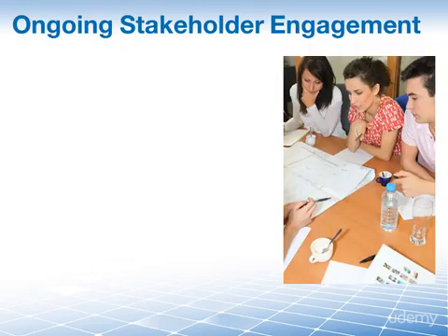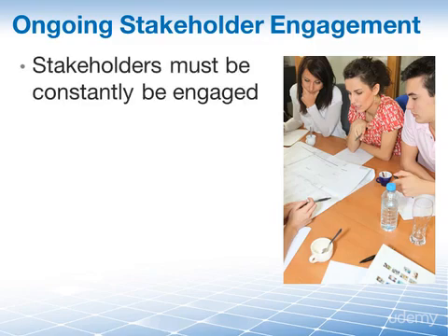Ongoing stakeholder activities are activities that should be proactively performed by the project manager in an iterative fashion throughout the course of the project. Although the ability of stakeholders to influence the project, as we know, is usually highest during the initial stages of the project, it's still critical that these stakeholders be engaged in all stages of the project. By performing ongoing stakeholder analysis activities, the project manager will always understand the current needs of each stakeholder, which may change the type of frequency and engagement with the stakeholders during the remainder of the project.